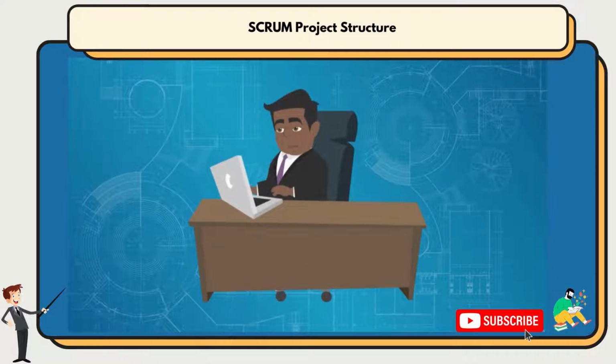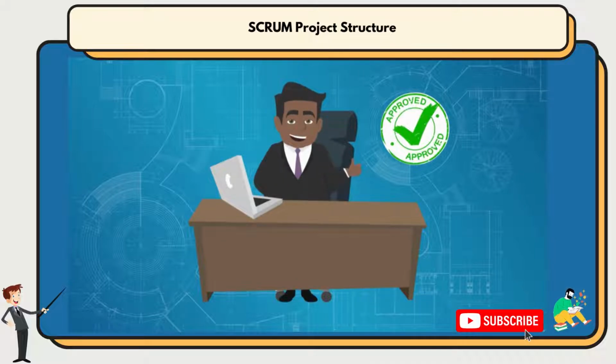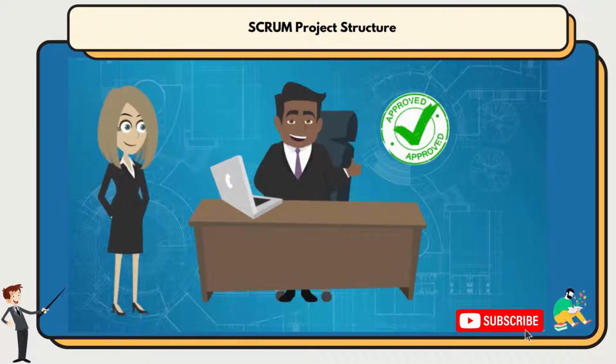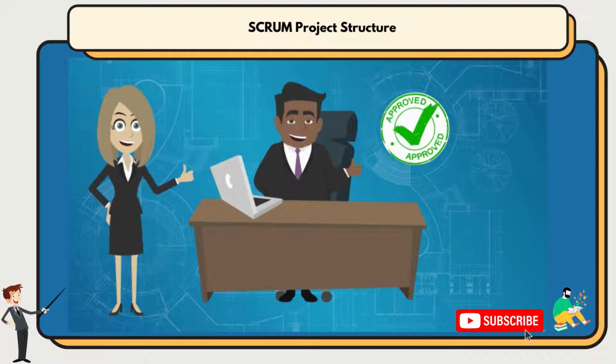After the work of the last sprint is completed, a closure phase should always be present at the end. Here, the customer will have to accept the product as a whole, confirming that it will satisfy the need, hence achieve the project goal. As per the established best practices, this is a mandatory step for any project manager before they can officially finalize a project.